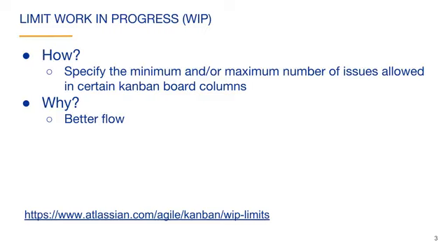Limiting the amount of work in progress means that issues are sure to achieve the done status. This means that the work is really done and can be provided to the customer. Moving issues into the done status is the primary measure of progress of the team. By limiting work in progress, any bottlenecks in the process are quickly identified because there are relatively few issues in progress at any time and problems tend to be easily visible. Identifying and fixing bottlenecks is a way to continuously improve the work of the team.